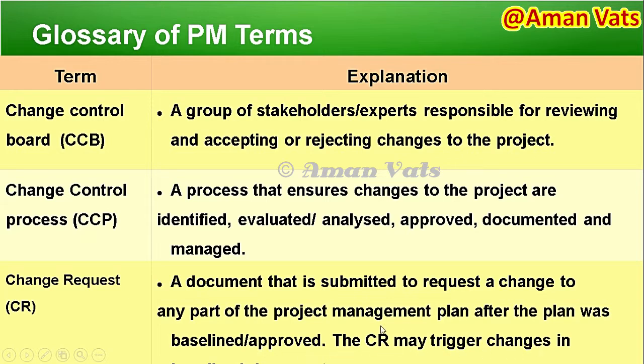The CR may trigger a change. The change request is a formal, legal document that has to be signed by the customer and handed over to the project manager, then it goes to the change control board. If it is accepted by the change control board, that initiates modification in your schedule or project management plans.